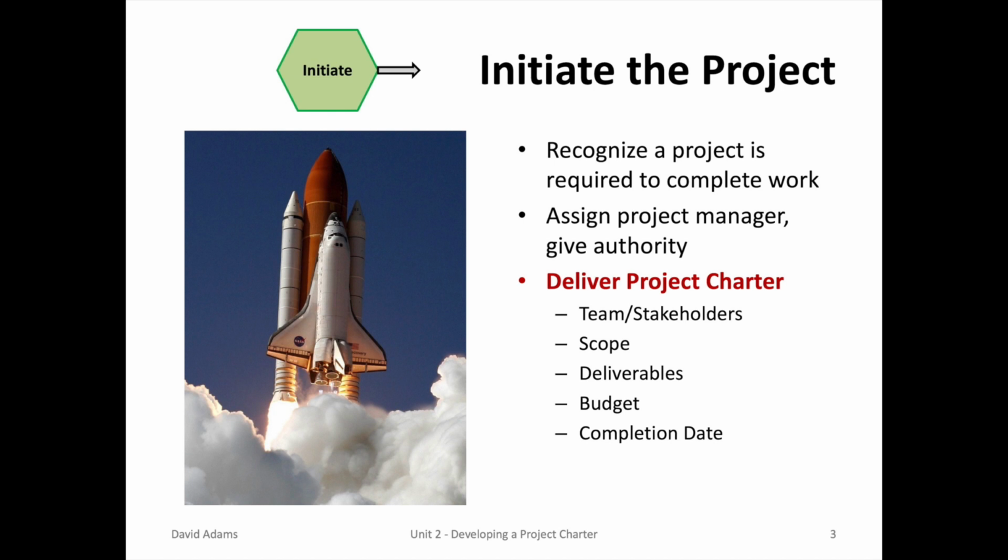Ideally, it's the project sponsor who drafts the project charter and gives it to the project manager. But in reality, in most cases, it's the project manager who drafts the project charter, gives it to the project sponsor to edit, and then it becomes formalized and the project charter is issued.